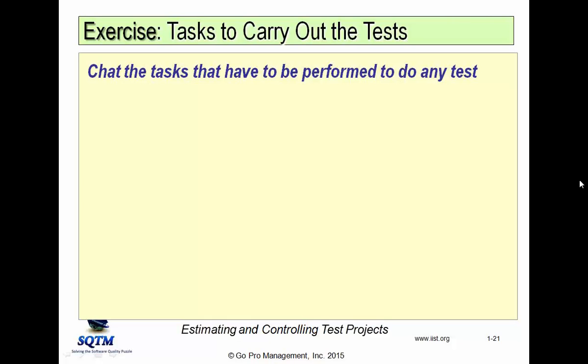Okay. So let's see. Strategy, data setup, test case design, defect mitigation if needed. That's a fancy term. Okay. Positive and negative data, good. Risks and assumptions and dependencies, user setup, account setup, passwords, things like that possibly are needed, okay, and so forth. Okay, now notice what you've just done. You've just identified, I don't know, like 10 different tasks that are involved in practically any type of testing.